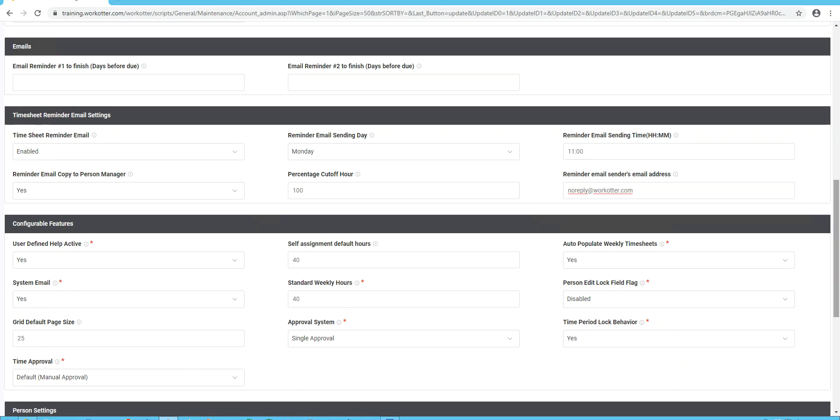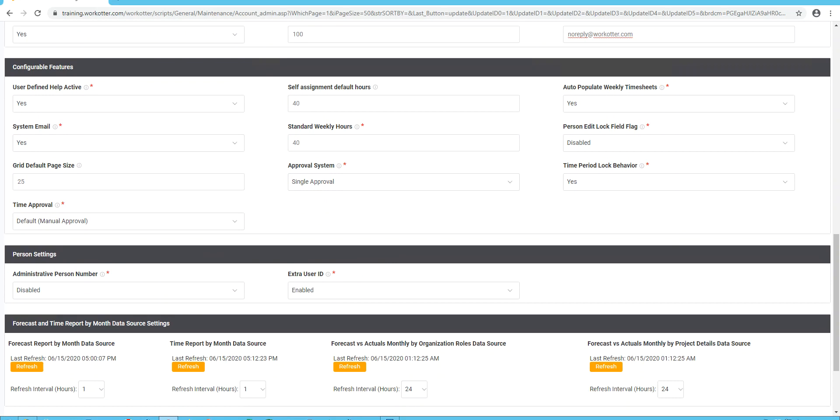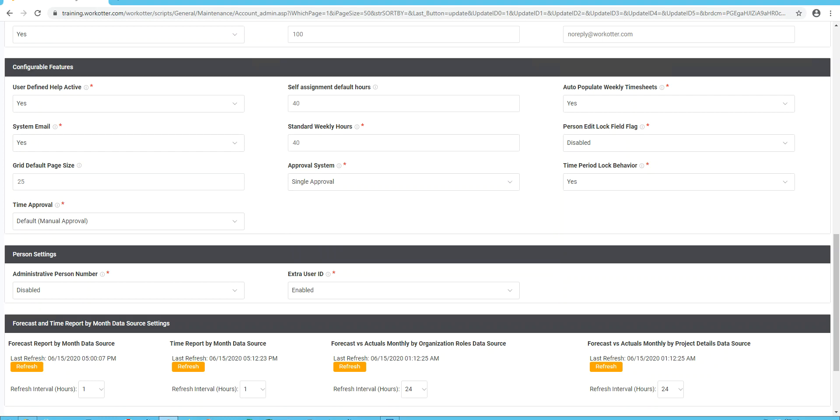Moving along. User-defined help active features. So this is a special capability. It's these little eyes, actually, that show up on the forms. And you can click on them and actually set up your own help notes. We recommend leaving it on and actually filling them in. It's going to be personalized to you, of course, your business. Self-assignment default hours. So what happens in WorkOtter is sometimes I'll create a task and assign it to a generic role, or I won't assign it to anyone. There's a way where people can then, who are on my team, self-assign to that particular task. And you can set the default hours because you might have a large pool of hours. Let's call it 1,000 hours. And maybe by default you only want them to take 40 hours of it, leaving the rest of the time available to other team members. Because the default otherwise is it'll just take all the time and it just becomes kind of an administrative burden to have to go back in and fix that. So we recommend leaving it at 40.